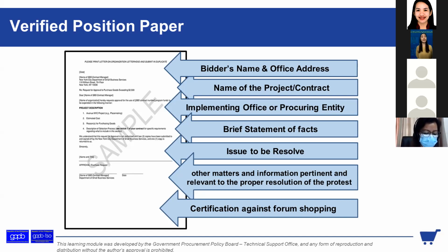If unverified yan, tapos walang certification of non-forum shopping, tapos wala pang proof of payment ng protest fee, then it is a ground for dismissal, no? Outright dismissal of the protest for failure to comply. So that is not curable na pwedeng ihabol.